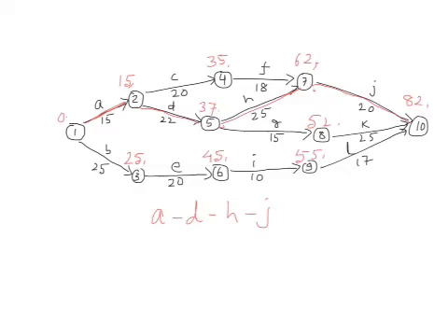Now you can very well check here that J is on the critical path, not K or L. So if you reduce the activity time of K or L, then that will only finish K or L a bit earlier, but J will still continue and that will get over after 82 days only. So the project completion time is not getting reduced. So if we apply resources on activity J and reduce it by 2 days, then that will reduce the